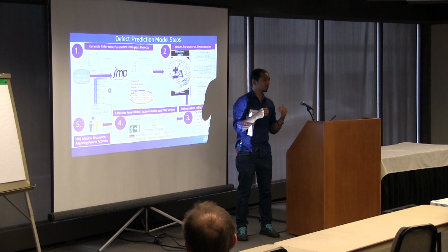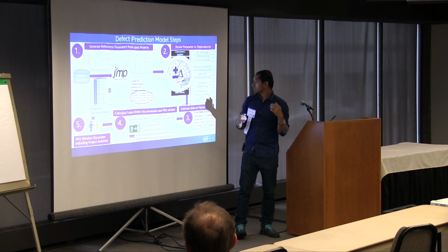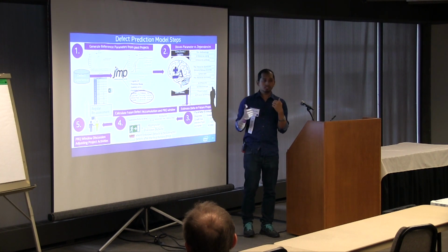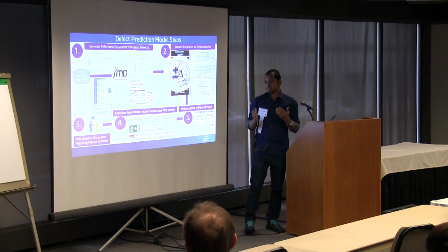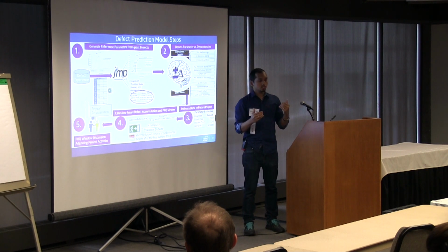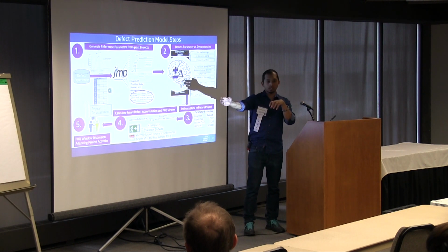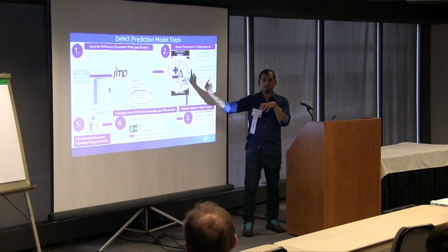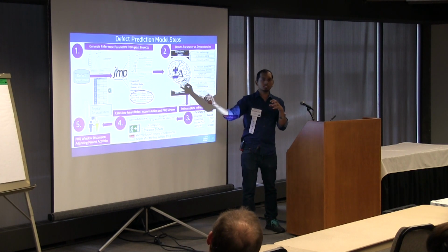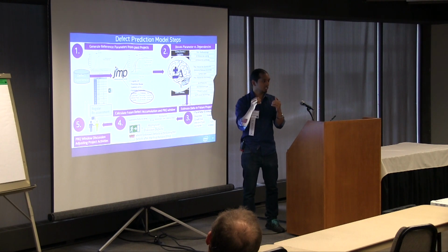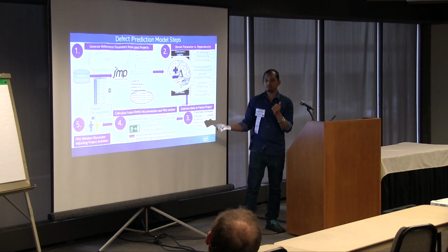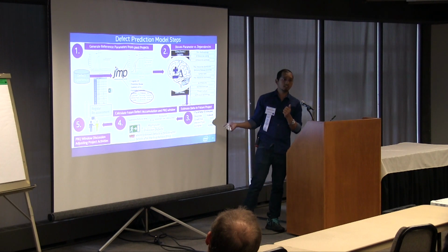Once you have a brief overview of what went on in the project, you do step 3, which is to estimate the delta to the future project. For a new project, say an additional feature of a previous one, you correlate this with those dependencies and apply techniques where you estimate that there is a 10% increase or a 20% increase, and then you finally figure out and say, hey, this is my final estimate.